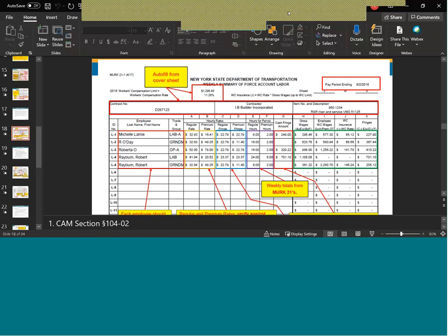There is the possibility that we may overpay them workers' compensation for that employee for that week on the force account. But again, think about the level of accounting we would have to do individually between the field office, your regional reviewer, the main office reviewer, et cetera, to recoup that cost.